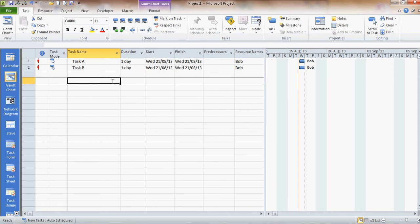I could get the computer to level resources. I could get somebody else to do the task, link the task or move the task. All those things would resolve this problem. But I want to give him overtime because I do want Bob to actually do both of those tasks within the same 24 hour period.